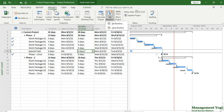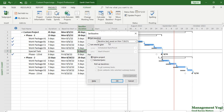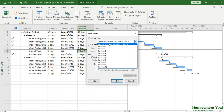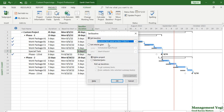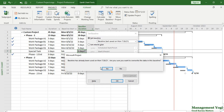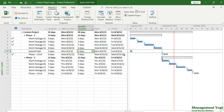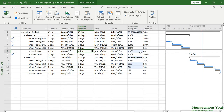To solve this scenario, simply set or rewrite the baseline. I'll go to the Project tab, Schedule group, Set Baseline, and set the baseline here. You can choose another baseline such as Baseline 1, or up to Baseline 10 if you have multiple baselines. I'll rewrite the existing baseline and click OK. It asks: are you sure you want to overwrite the data in this baseline? Yes. Now the value is properly shown — on this date it should be 100% complete for the special task, and it is showing 100% complete. Note that this baseline just got overwritten compared to the previous baseline, so the percentage values have changed.